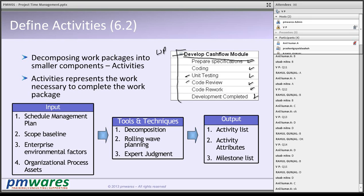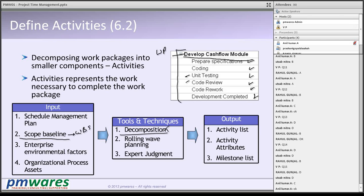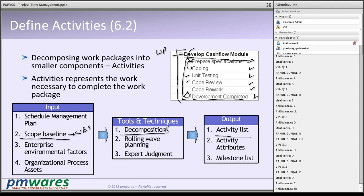The scope baseline — basically your WBS — is the input here. Decomposition is the terminology used, though a better word would be identification of activities, since we are listing activities rather than dividing. What we get is the activity list, activity attributes (when it will start, who will work on it, whose predecessor or successor it is), and a milestone list. Development completed could be a milestone, for example.